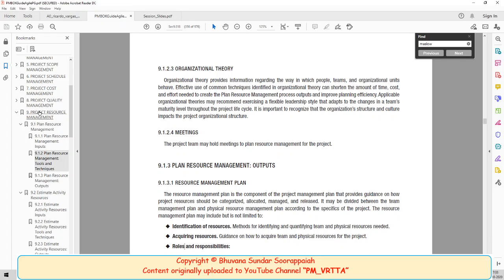But in PMP they have decided that I will give 4 times weightage to the most likely, and I will sum up the weights and divide by 6, which is the total weight. So this is the formula you use in the PMP examination also. As I said, the advantage of this formula is not only that it carries more data points, it also gives realistic weightage to these points, and it gives higher weightage to the more likely option. Of course, I will not get into this now; I will cover estimation techniques in a separate session.